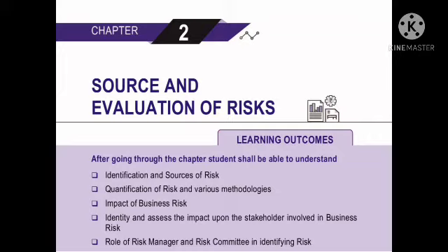Qualitative risk assessment. Risk probability and impact assessment generally finds answers to the following questions. What is the probability that a risk will occur? What will it cost the business if it does happen? The probability and impact matrix indicates which risks need to be managed. A simple way of assessing a risk is by attaching a probability and impact to the happening of an event. If it is certain that an event cannot occur, it is given a probability of 0; if it is certain that it will occur, it is given a probability of 1.